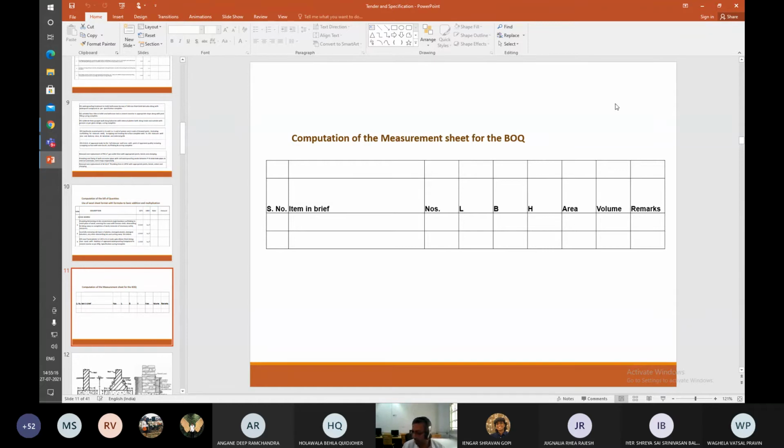Most important of all, marking out the center line on your site is not mentioned in the tender document, and you're not going to be paid for it. The next item that you can bill for is excavation for your footings.